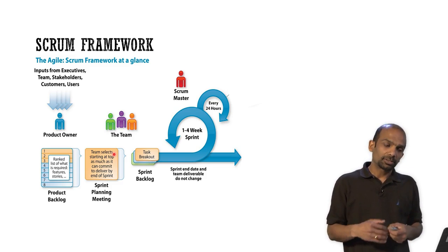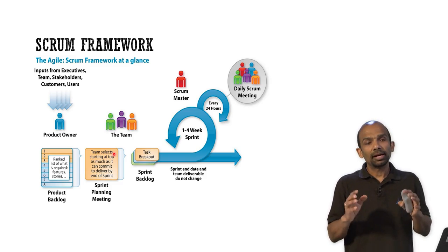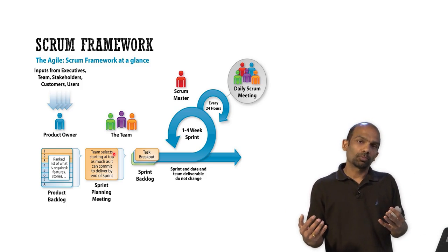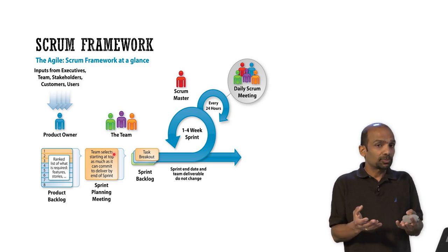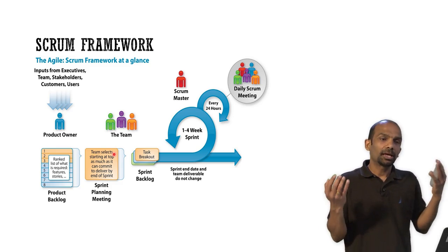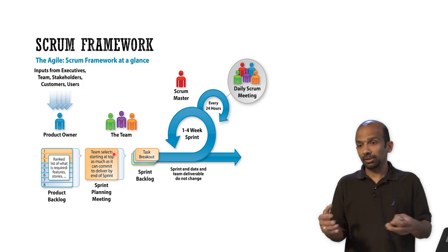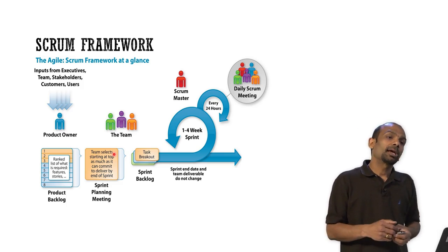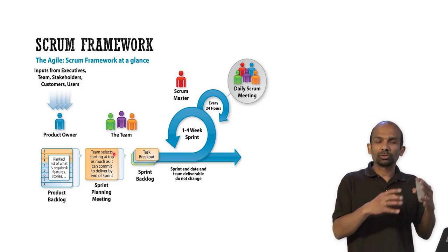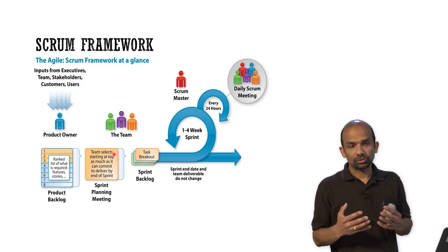And that starts this sprint where everybody is working to implement the software. And during that sprint, the whole team gets together for a daily stand-up, in which everybody talks about what they did yesterday, what they are going to do today, and if there are any roadblocks. So in this case, a database person may say, well, I designed or created the tables yesterday in the database, and then today I'm going to populate it with some test data, and if anybody out there can help me, that'll be awesome. And then he may also say that I don't have the permission for certain things in the database, and unless I have that permission, I won't be able to finish my job.